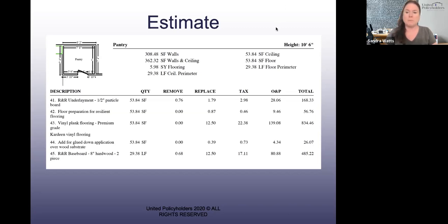Okay, so back to what we're doing here. Let me tell you that Xactimate defaults ceiling height at 8 feet. This house that I did a while back had 10 and a half foot ceilings. So the first thing is, be on the lookout if you have higher than 8 foot ceilings, or if you have like vaulted ceilings.